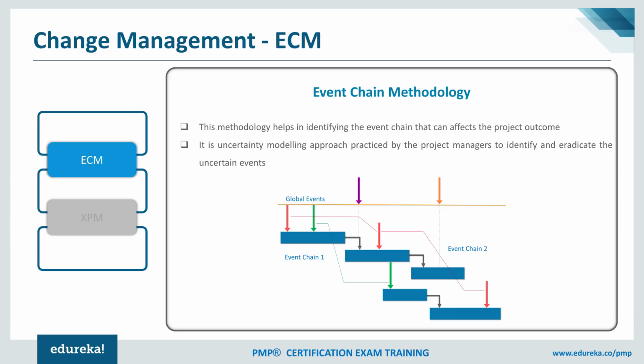And all these things put together help us in managing uncertainties effectively. So for example, if lack of resources would have a huge impact on the delivery of this project, then I would ensure that I have some mitigation plan if tomorrow my resources leave the project or I might not get enough resources available for working on a certain technology, etc., then I may like to engage certain contract resources very quickly.